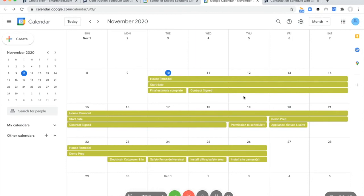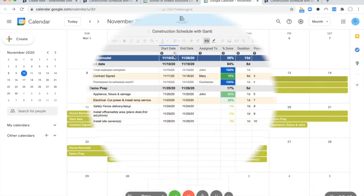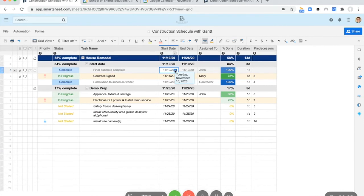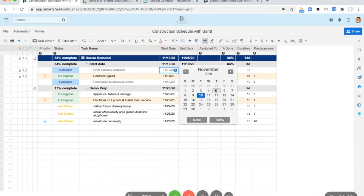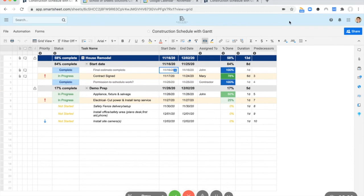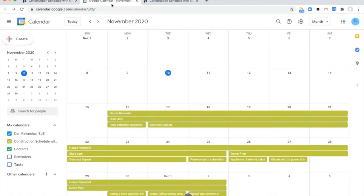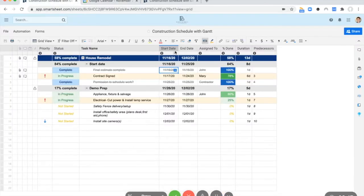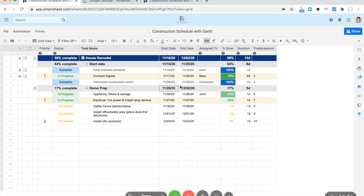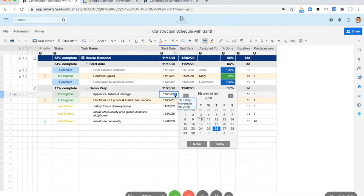So using this one way sync, definitely make any changes in Smartsheet. For this project is now going to start on the 16th. Let's save that. So we just changed this to 11/16 and now 11/16, maybe the demo prep or technically this is a summary. So we need to change the lowest or the first rather child.